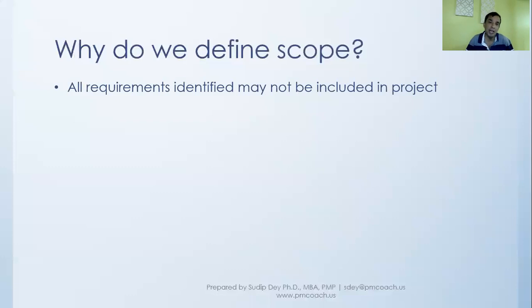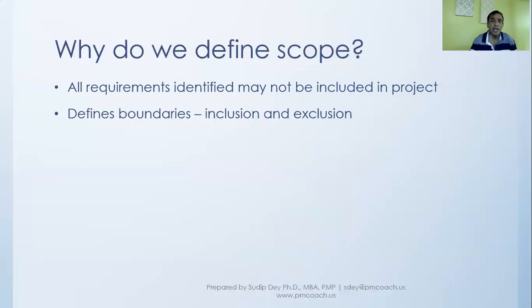And there is a reason behind it. When we are doing that, we are not trying to judge, or saying, hey, you said this, no, sorry, this is not something that we will do, because we are not at that position yet. So we want to get all the requirements and then decide what should be within the scope and what should not be within the scope.